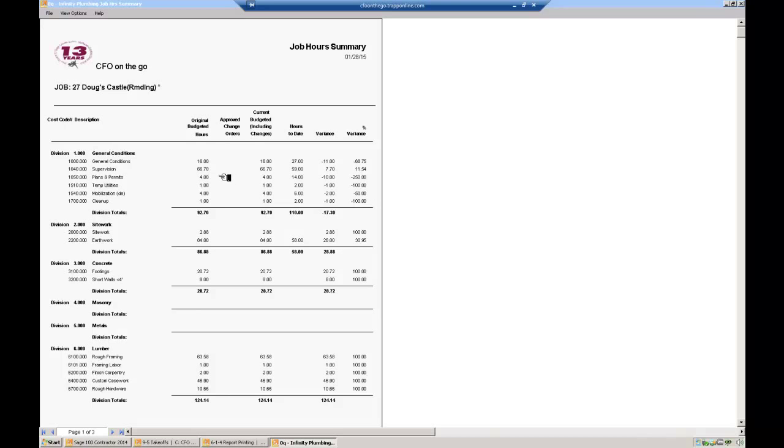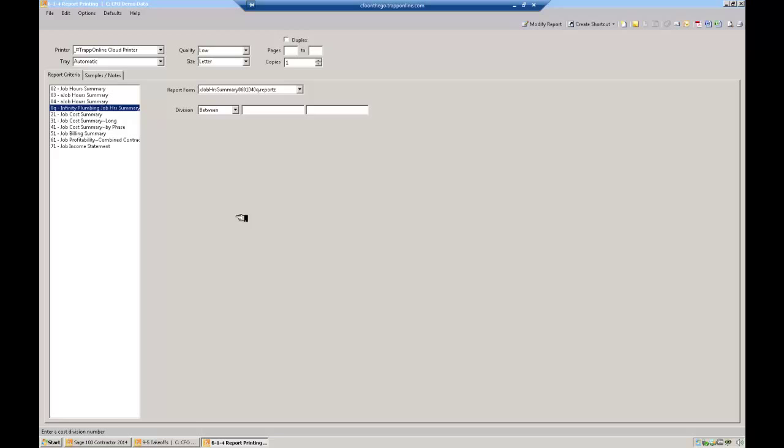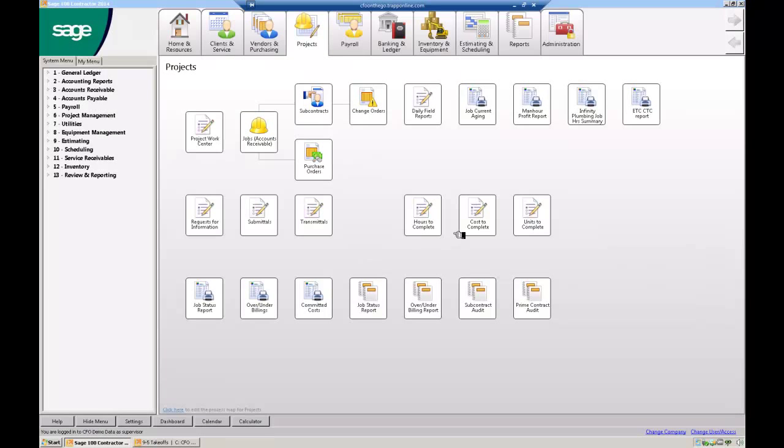So I can give this and share this with your project people. There's no dollars on here. It just says, hey, Joe, you're supposed to do this in an hour and it took you 2 hours. How'd that happen? You're supposed to do this in 4 hours and it took you 6 hours. How'd that happen? Etc. So you identify all of the overruns and identify those for future estimates. So that's a great report that we have. There's other ways to look at it as far as unit cost, dollars. Anyway, standard reports here, just a ton of them. But I'll send you some samples of those. But I wanted to jump into the service module real quick.